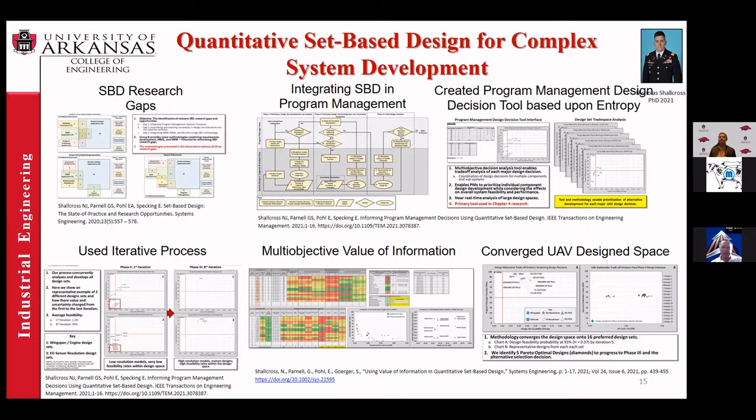And what he did from a multiple objective approach, and why he did it for the set-based design, was he was trying to help program managers know, okay, so we have all these models and simulations and all these other things going into the model, but what model or simulation do we need to increase the resolution to get more information? Where should we spend that time on? Because you can't spend it on everything. And some factors are not even worth spending the time on. And so that's where this value of information came in handy to help him be able to help program managers do that.